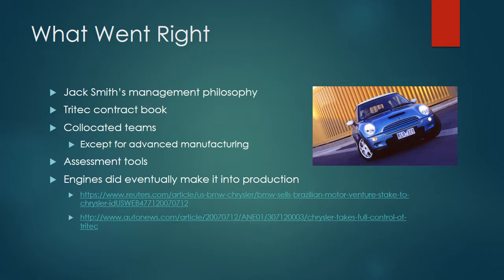There was also the Tritec contract book, which was an attempt by Jack Smith after the fact at developing a sort of charter. The Tritec contract book was signed by every team member and specified the measurable objectives of the project, the processes used to achieve them, and meant to help team members understand and agree on the overall strategy. It also contained a mission statement.